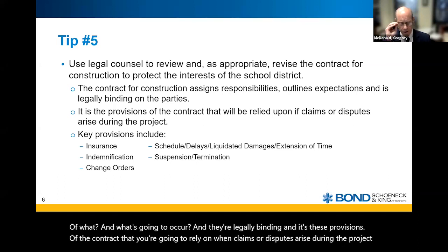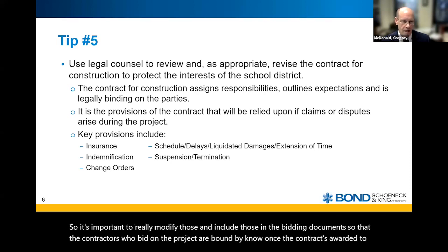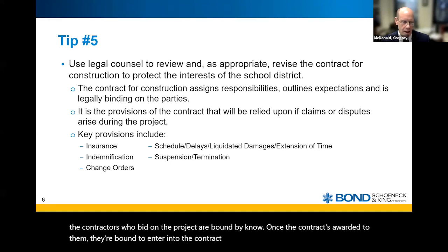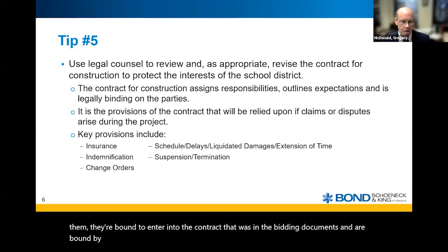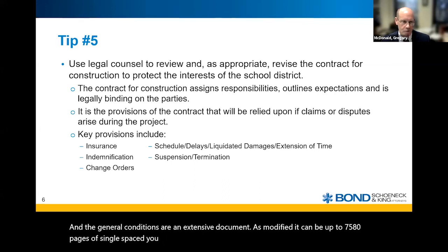So it's important to really modify those and include those in the bidding documents. The contractors who bid on the project are bound, once the contract's awarded to them, to enter into the contract that was in the bidding documents and are bound by those general conditions. The general conditions are an extensive document.